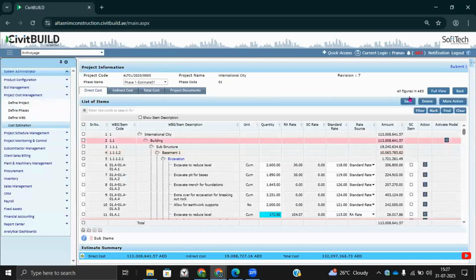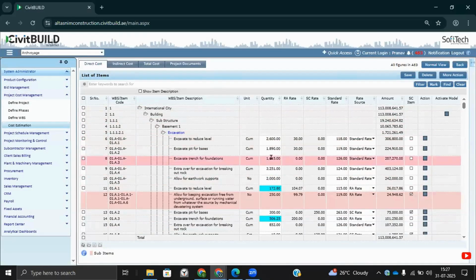Remember, this is our budget WBS, which will be available to the execution team for making the execution. So they will have a cost, but not a price. The rate available here is associated with the cost, not the profit margin. So they will always have the constraint of the budget to execute the project and have proper control over the budget.